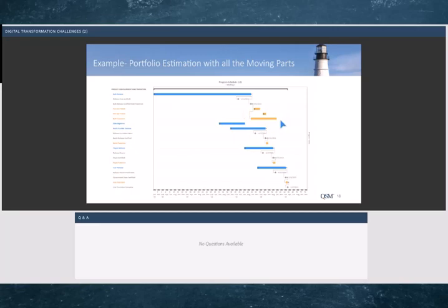Now, this is actually from our master plan tool. If I actually had the master plan tool open, I could take a look at the interdependencies in real time, live. I could take this bar, this estimate here, and I could move it forward if the schedule slips and see how that actually impacts the release from another vendor that we might be managing. To see if the code drop is late, how does that affect the cost and effort on the release that this other vendor is working with, or maybe another in-house part of the team. So I can see how all the moving parts come together. I can see the big picture, cost, schedule, effort at the lower level, as well as the macro level. And I can make decisions very early before we even start any detailed level planning.